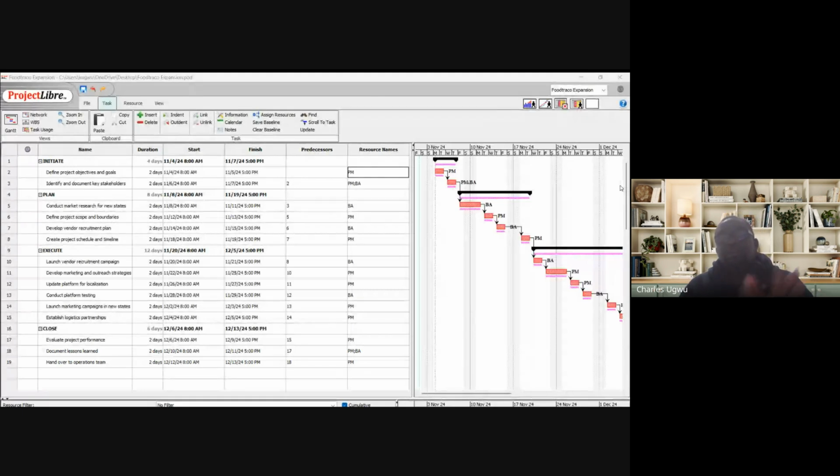The person that came to set up the environment and go may just be a part-time worker who just came, spent a few hours and went. You might assign like 20%, depending on the time the person spent on that task. But some people that spend the whole day working on that is 100%.